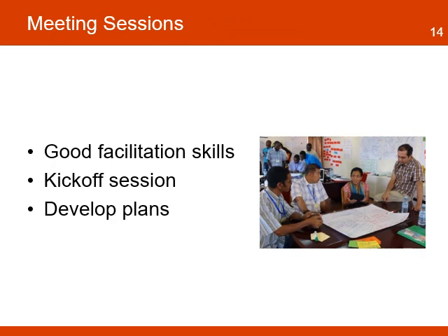The number of meeting sessions depends in large part on the number of plans the project wants to include in the participative process and the complexity of each plan. The number can vary from 2 to 5 in a short period of time. To lead the sessions, it's important to have a person with good facilitation skills who can manage the participative process. The first session is the kickoff session and will set the stage for the next meeting. In this initial meeting, it's important to set the expectations, the scope, and the roles and responsibilities for the planning sessions.